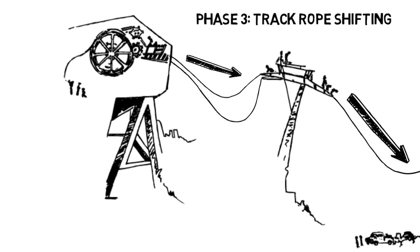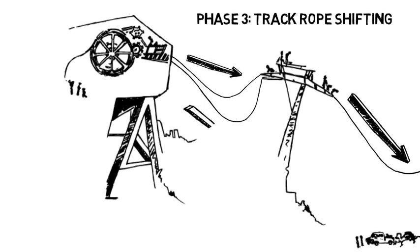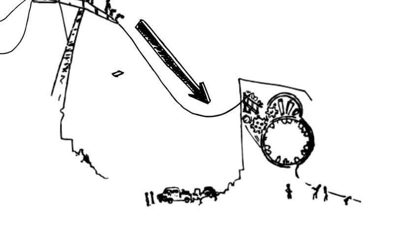In the end, each of the four track ropes will be pulled 150 feet downhill. Once the rope is shifted the required distance, the excess rope will be cut and recycled.